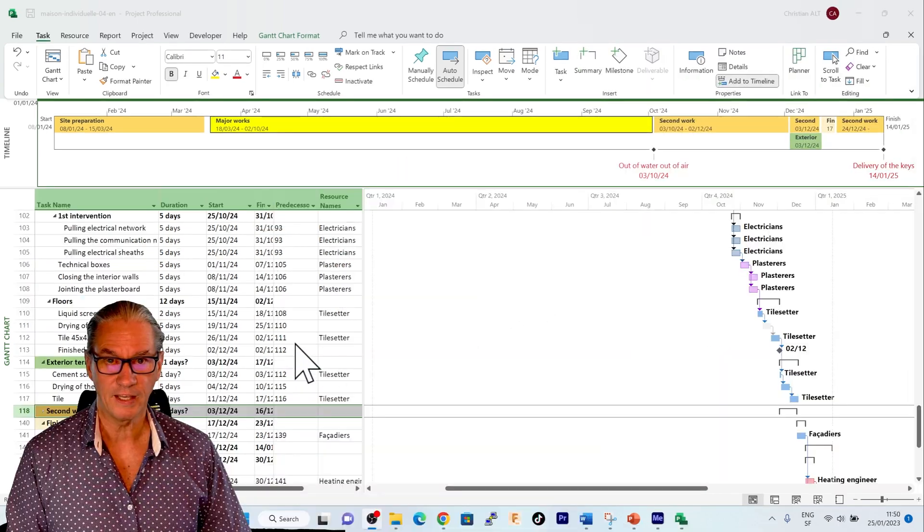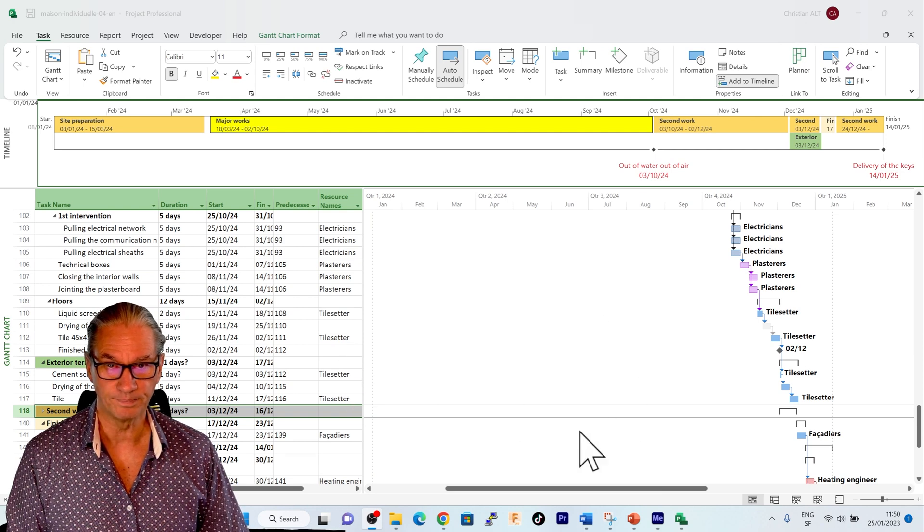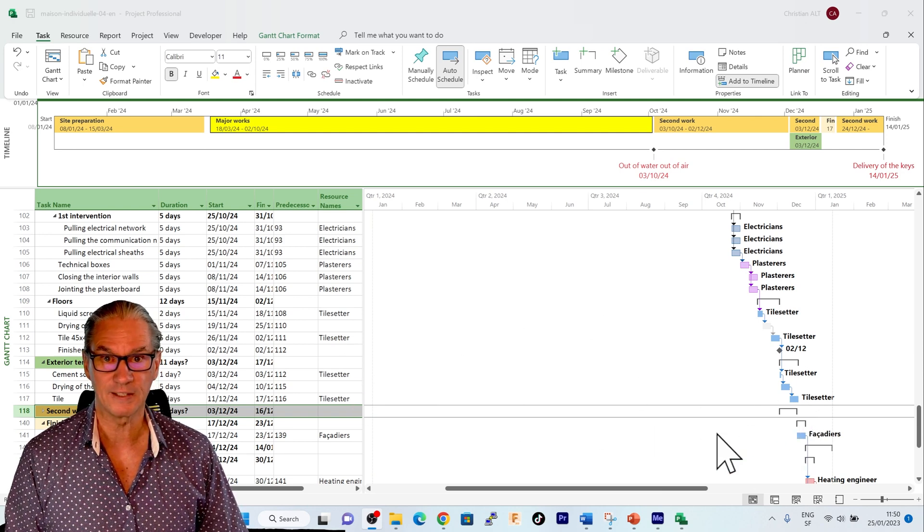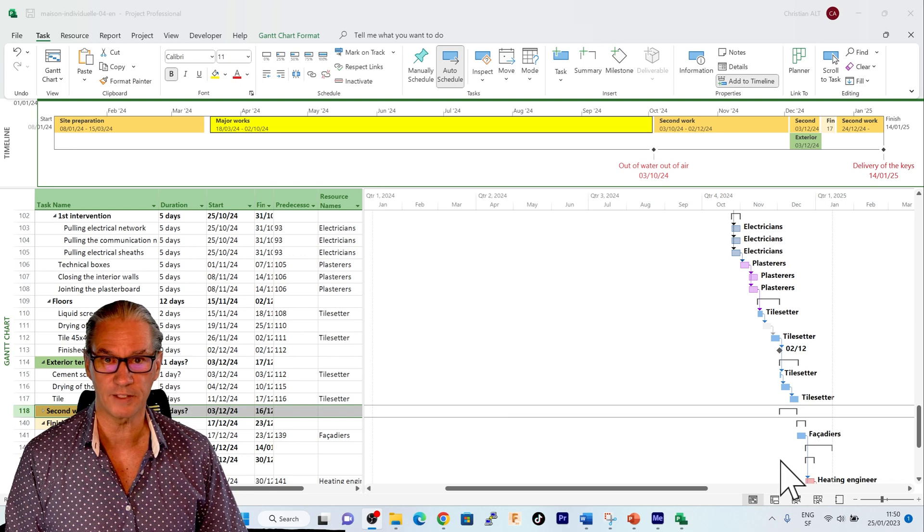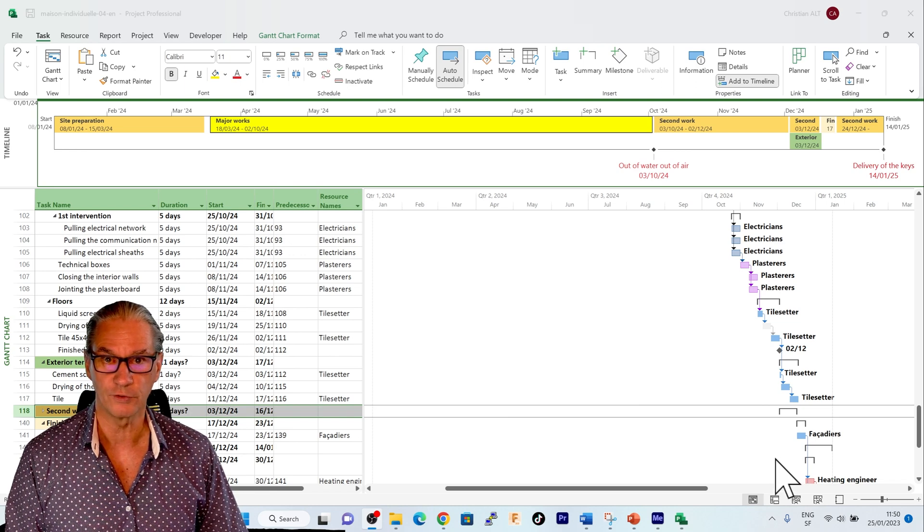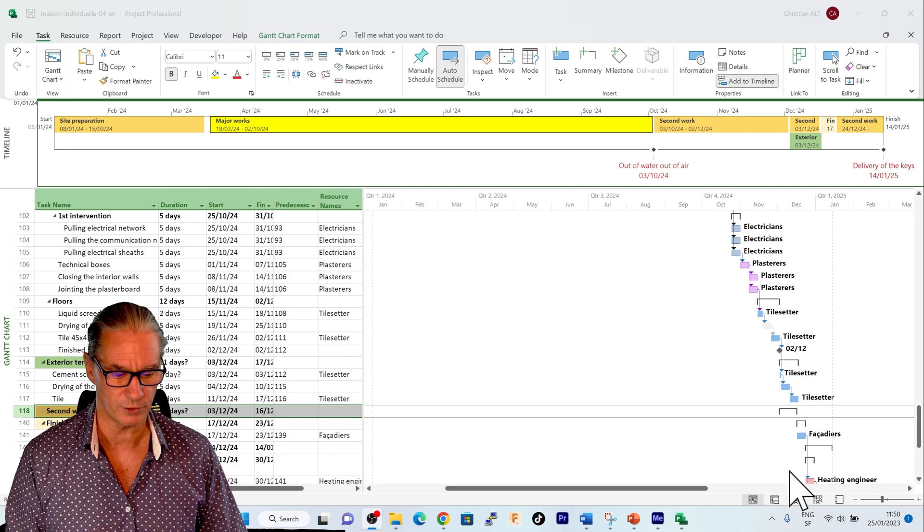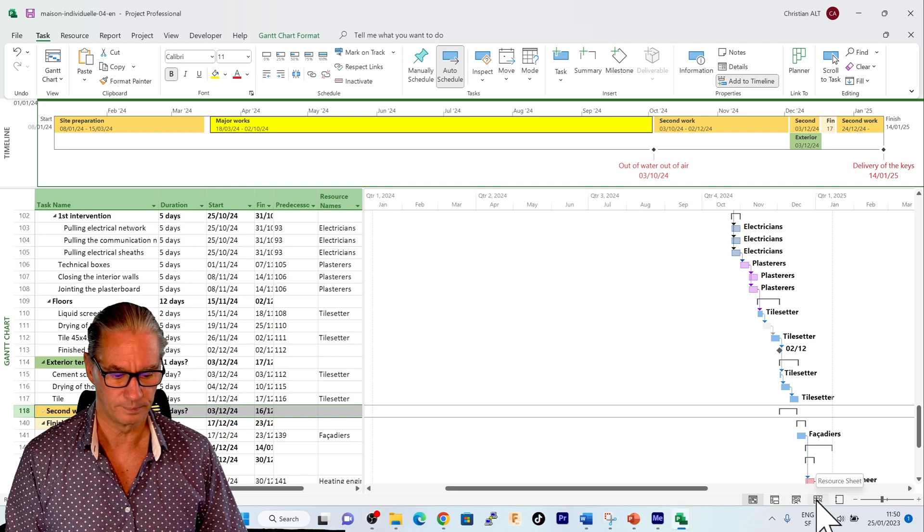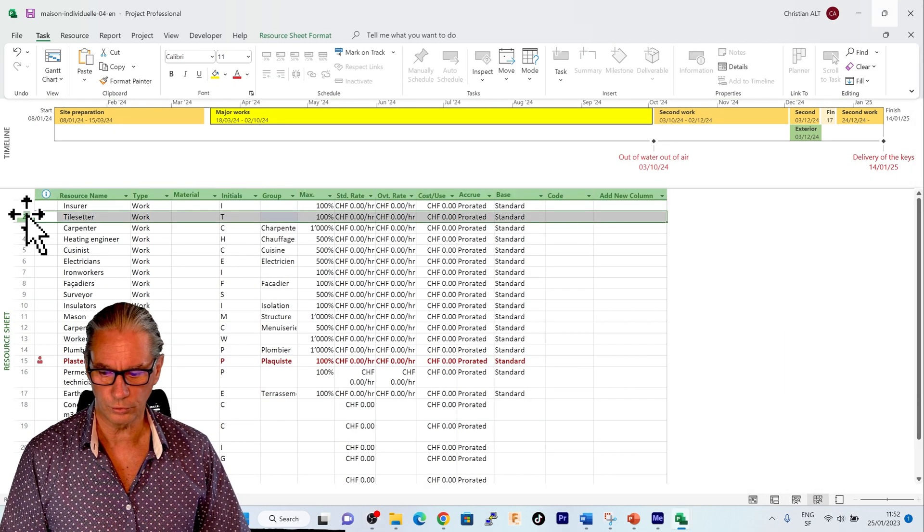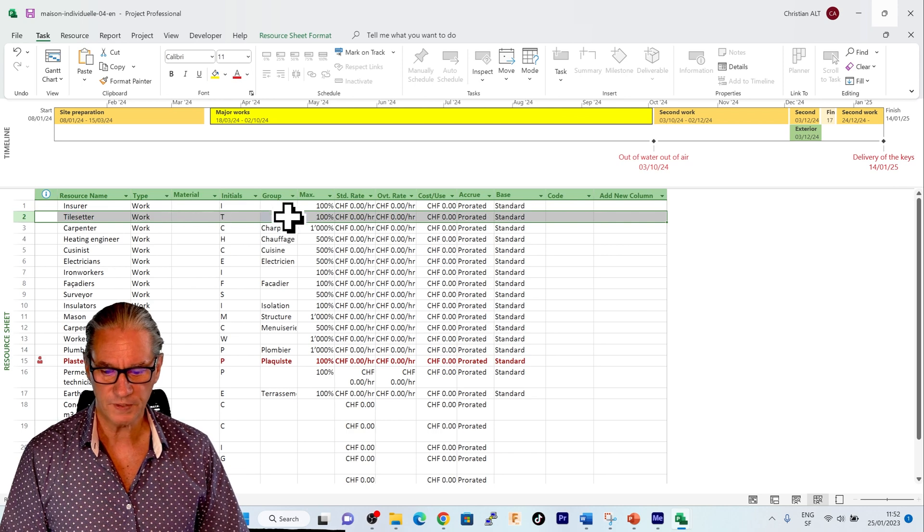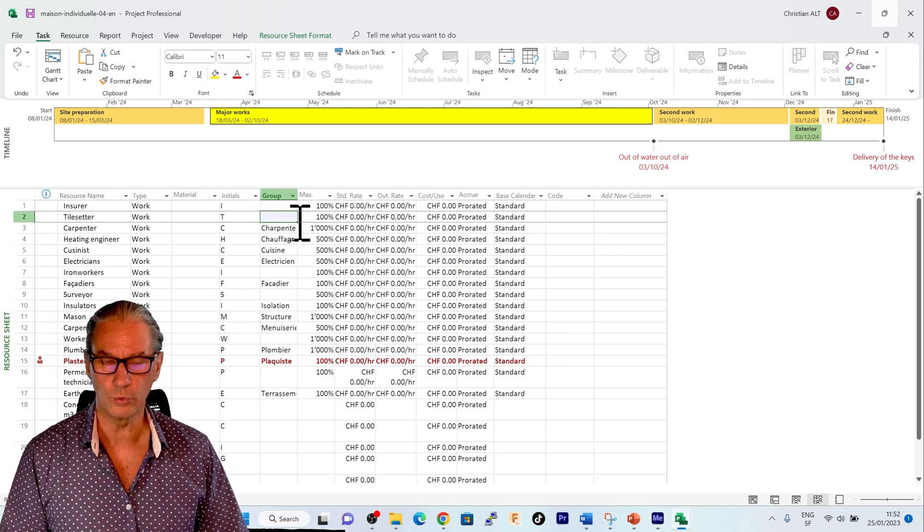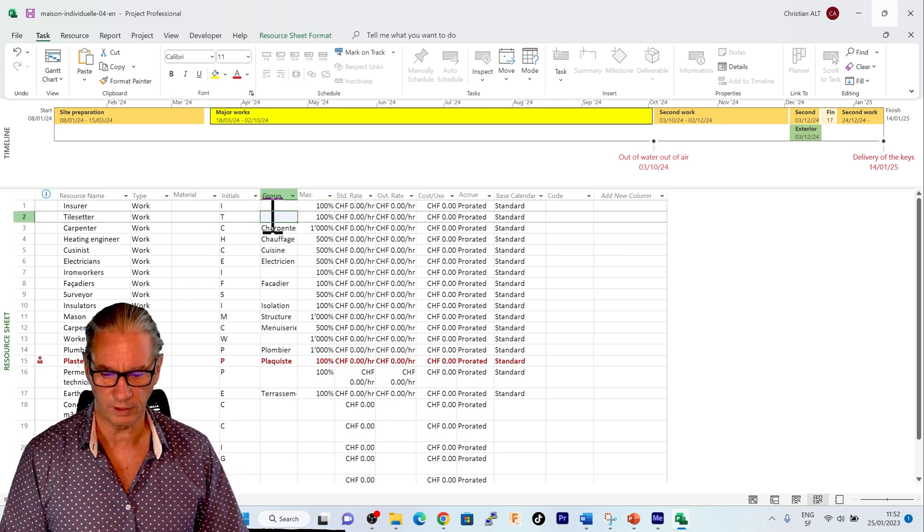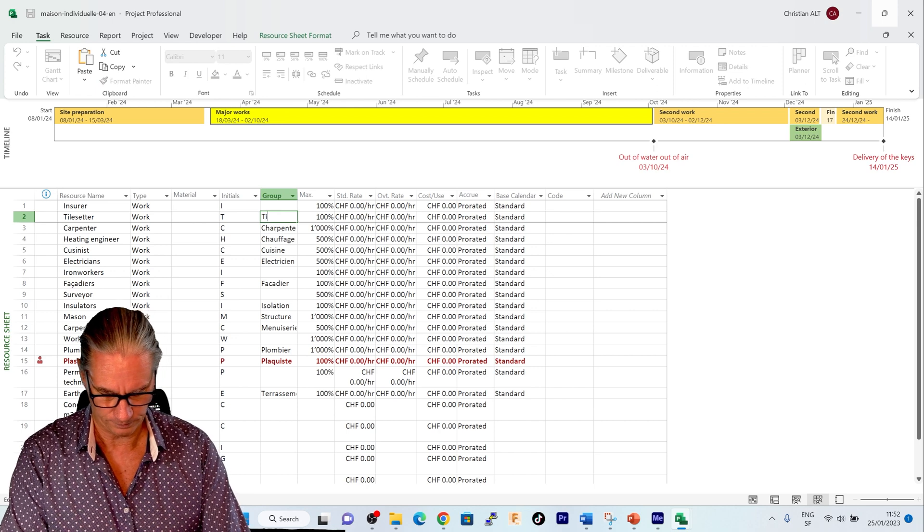If I look down here, I see that the tile setter, they don't have a specific color. So the first thing to do is now to go to resources. We see on line 2 the tile setters. We see that no group is defined. I will define the group tile setters.